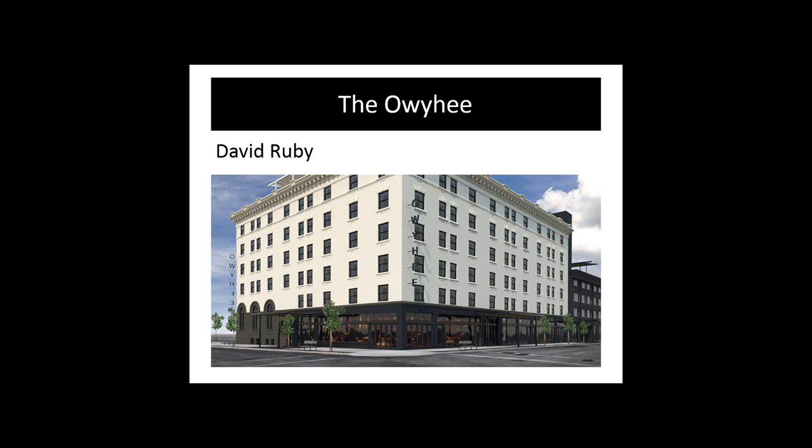We found a vault of drawings, but they still didn't even really begin to tell the story. When you start peeling away the layers, we just found midnight construction that probably was done without a permit. And that's where the team kind of huddles around the table and says, okay, we thought we had this much money to do this with. That starts to get eaten away by all these necessities, by getting asbestos out of the building or plugging holes or a lot of things.